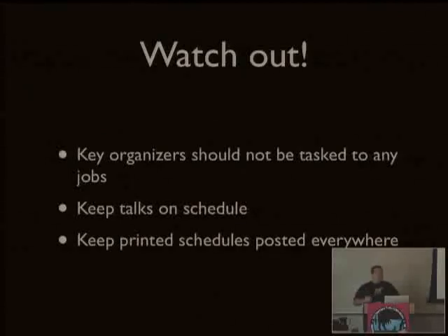A couple things to watch out for. Your key organizers should not be tasked to any jobs. There's going to be stuff that comes up that you did not expect. There's going to be people with problems that you have to deal with. There's going to be security guards that are asking, why the heck are you here? You're going to run into all sorts of problems, and you need people that don't have a job already to be able to deal with that. Because if you've got your organizers tasked to something, and then something comes up, something's going to get dropped so that things can be dealt with.